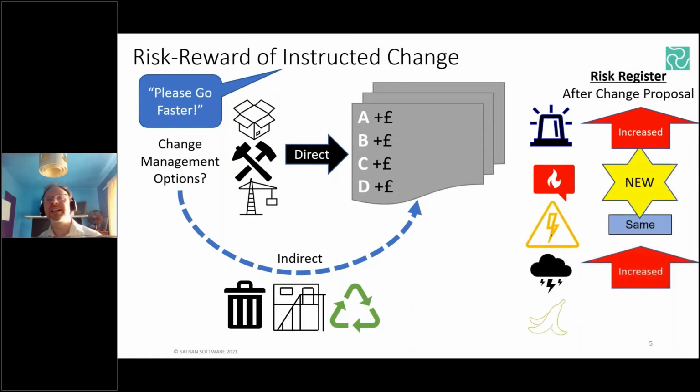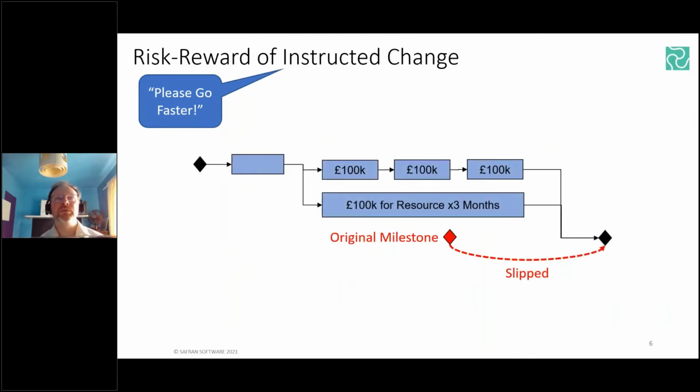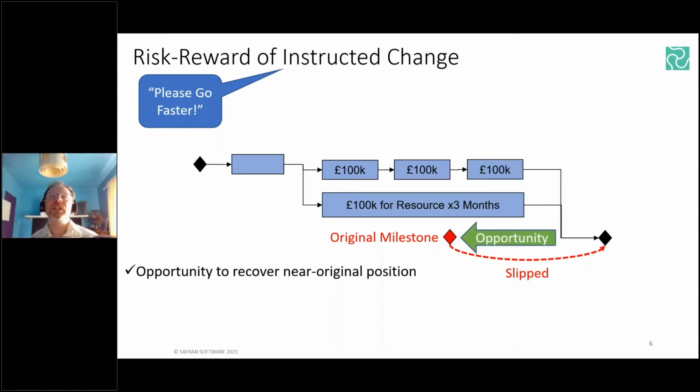So for example, bringing in a second tower crane at the other end of the site increases your productivity, but now you are notionally twice as exposed to, say, the high wind speed risk that might trigger a downtime. Now, the disciplined use of time-related cost was absolutely key in articulating these changes in our risk profile to the project manager for things like compensation events, etc. But just for example, imagine that one of our project milestones has slipped due to a mixture of reasons spread across multiple parties, but there is this willingness to explore the cost of recovery versus the cost of merely attempting to maintain the status quo with the existing risk profile.